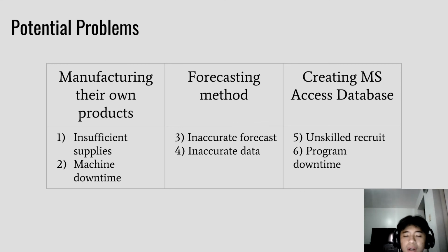So all of the problems in each category received a risk score of high because it's within the range of 10 to 19. Therefore, each problem has a prevention solution in case it occurs and a corrective action to avoid experiencing the same issue.